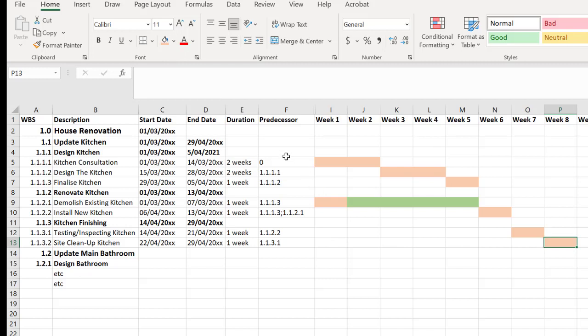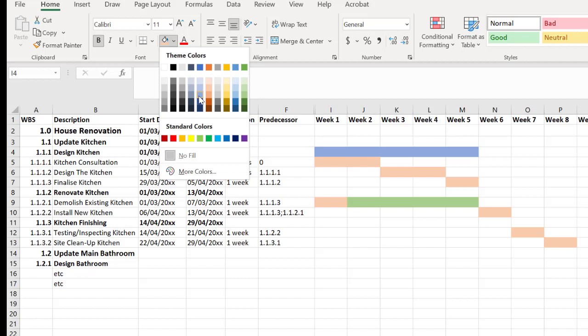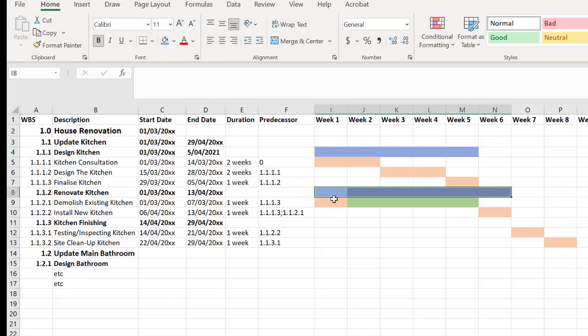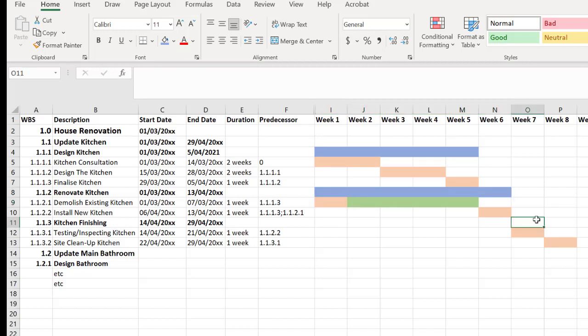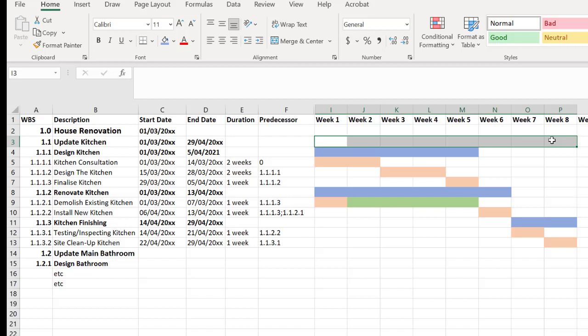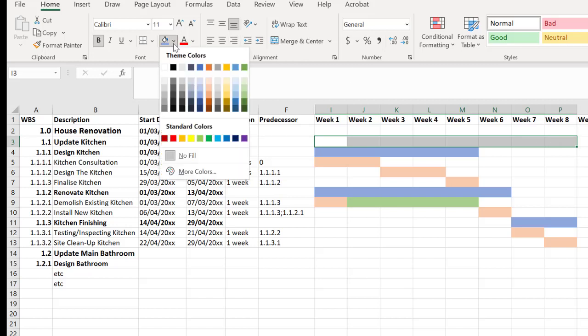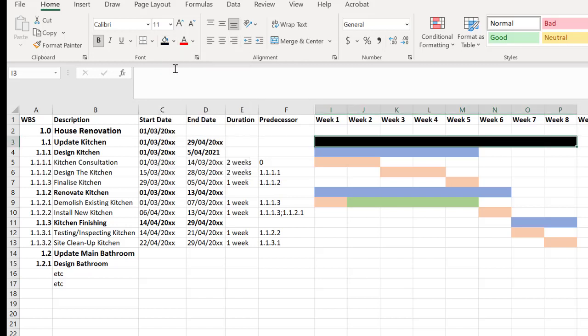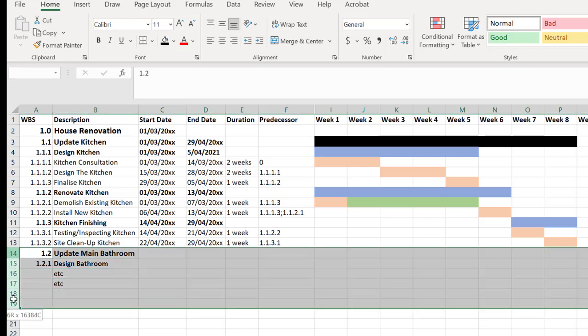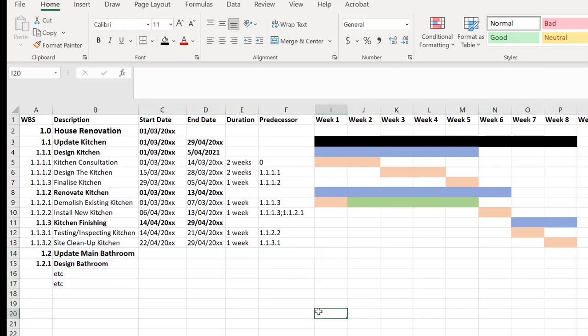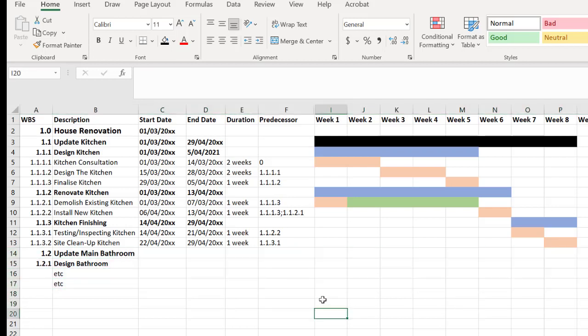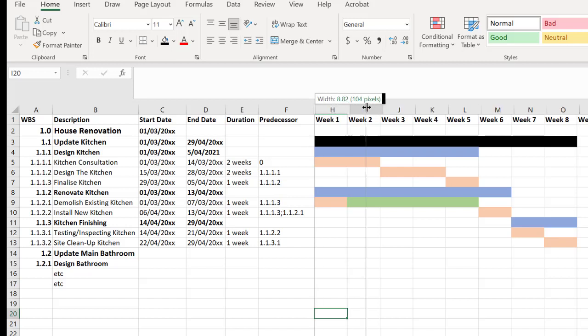We can then go through and look at designing the kitchen and go okay well that goes across that time period. The renovation goes for a little bit longer remembering we can decide when we demolish according to this Gantt chart and the finishing activities happen right at the end. And we can also show that updating the kitchen as a deliverable goes across the first eight weeks. So we could do a similar thing for all the subsequent deliverables to show our Gantt chart. I'm just going to unhide those couple of columns.